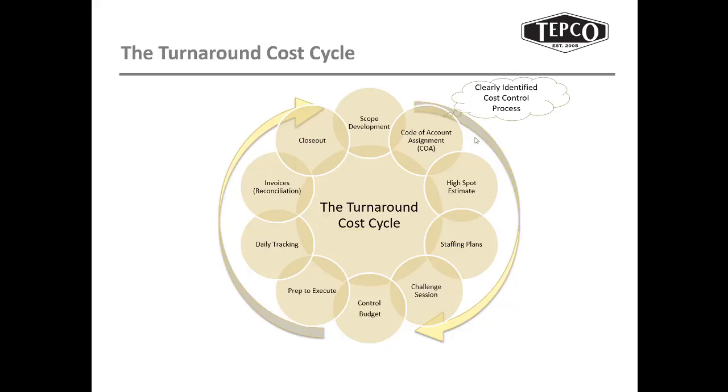A lot of places are very unclear, or they go from work order to work order, and it's not manageable. But with a code of account or a collection process, it makes it very understandable and very clear. So this is how we report the cost out. So once we identify the scope, it goes into particular buckets. The buckets are then produced a 50% estimate.